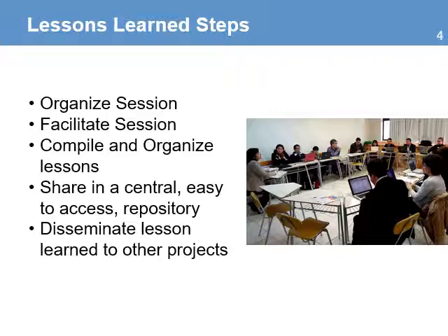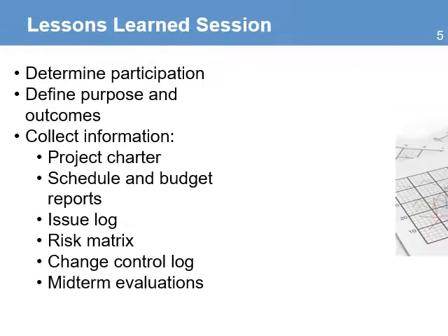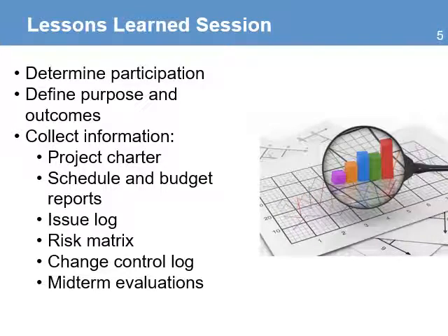At the end of the session, collect and organize all the lessons identified in the session. Share the final document in a central, easy-to-access repository, and then communicate and disseminate the lessons learned to other projects in the organization. Here are some steps to help you organize the session.